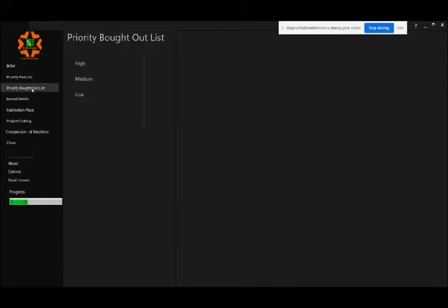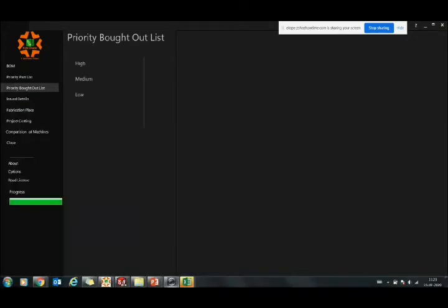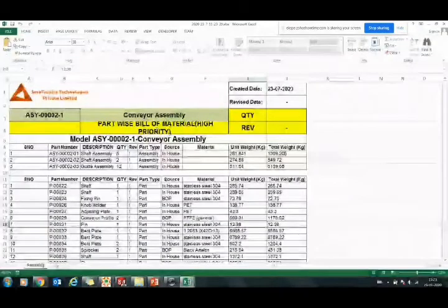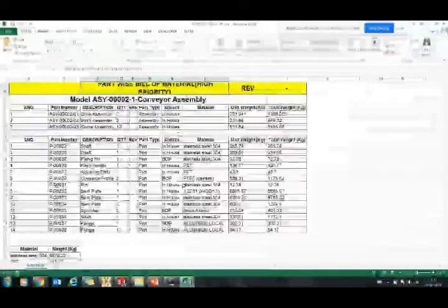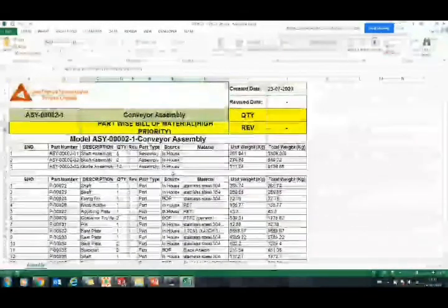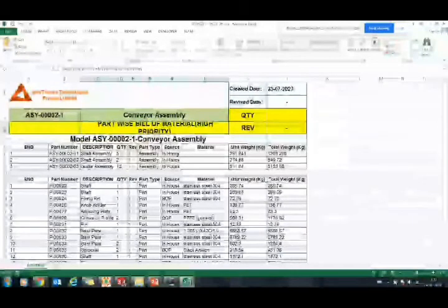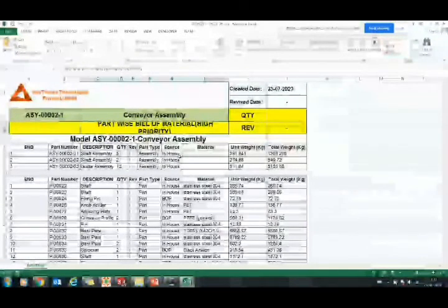As we said, we need to meet the delivery. We have a set delivery date. We have a zero date, and we have a purchase order. We have a delivery date wherein we have to dispatch our complete machine to the customer, right? So within that span, we have to plan our fabrication, design, engineering, everything. So this gives us a glimpse. You can see there's a part-wise bill of material, high priority, and you can give this priority list. This is basically for complete manufacturing planning, the complete project planning.